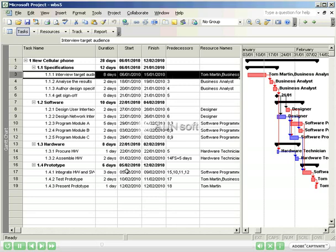Before you record any progress or tracking information, you must baseline your schedule. This simply means take a copy of the schedule and set it aside for comparison later on.